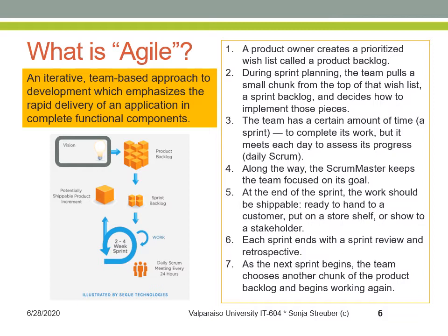The product owner then communicates her vision to the team in user stories. User stories describe the product scope and have a very similar function to requirements in a traditional project lifecycle. These user stories are collected in the product backlog. Each one of them is a little cube here, and then prioritized by the product owner and estimated by the technical team based on technical complexity and work effort.